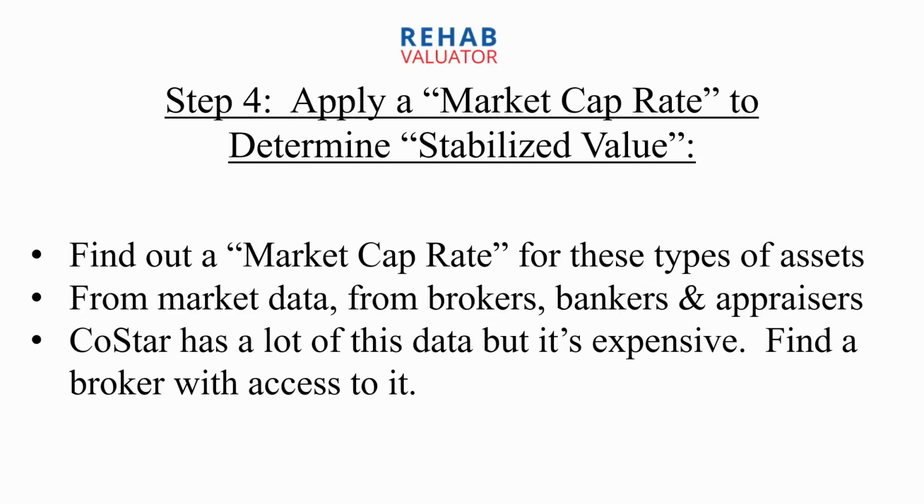So you should find a good local commercial broker that has access to the data and figure out what the market cap rate is, because it plays a crucial role in what this building will be worth. Because when you go to get your construction loan, your lender will take your plans, take your specs, take your finishes, take your floor plans, give it to an appraiser, and that appraiser is going to create what's called an as-built appraisal that will determine how much money for construction your bank will give you.